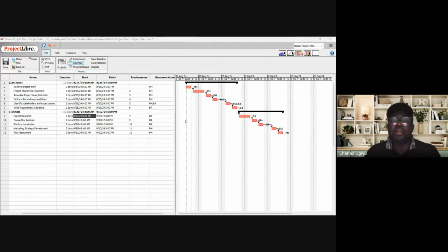Let's say this weekend I'm planning to have a session with you guys, and in my project I want to highlight that I'll be working on the 17th and 18th. That's Saturday and Sunday. So I'll hold my control button, click on 17, click on 18th, and then I will go to non-default working days. I'll click on that. I want to make it working days.